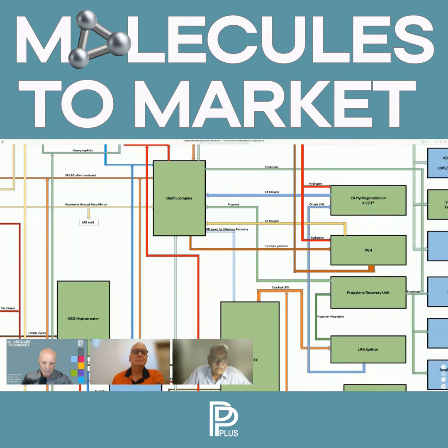Linde, we have one plant in India, but again, I don't know whether they do common licensing. We've seen them more on the EPC side. Plus, they will struggle to become a licensor in India because their technology has a lot of proprietary equipment, and that is a little bit of an issue in terms of technology selection. But between Technip and Lummus, there is no issue. They freely license the technology, and this is a very critical process insofar as the objective function is concerned. So I think there can be a technology selection out here.